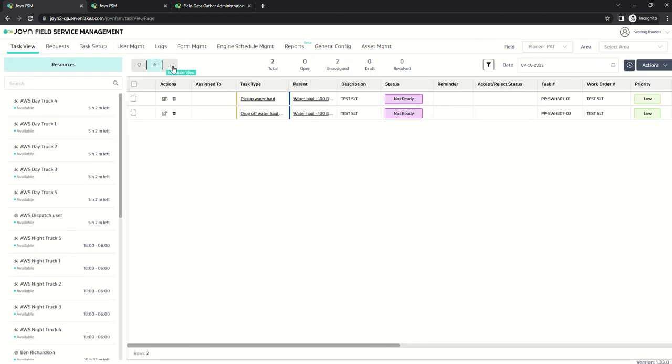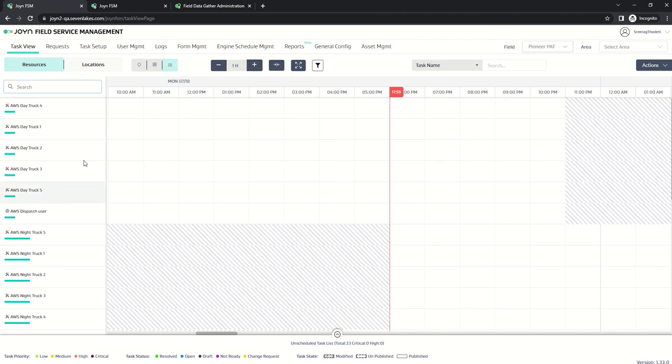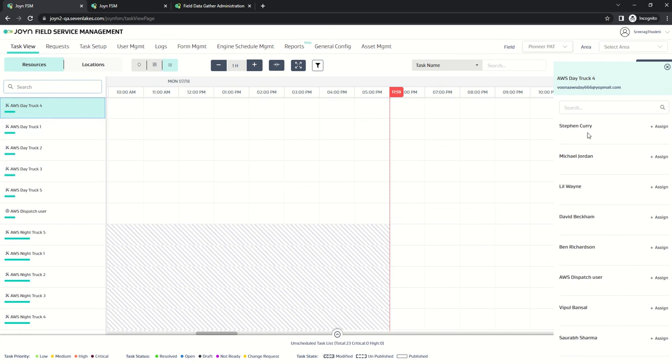Now let us see from scheduler view. Whatever has an equipment resource flag checked will have a new addition here. When we right click on this user, we will see the set operator button. When we click on set operator, we can select the operator. These operators are nothing but normal users who are also set up in the same teams and areas as the equipment resource.